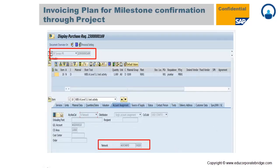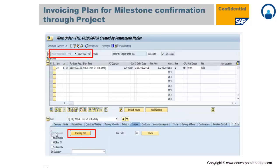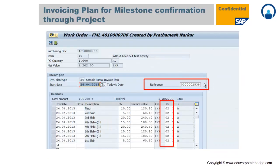You then create a Purchase Requisition for services with account assignment NND, providing the network and activity number, and save it. With reference to that requisition you create a work order. In the work order, under the Invoice tab, there is a sub-tab called 'Invoicing Plan'. You click on it and copy the invoicing plan, and all milestones get copied into the work order.